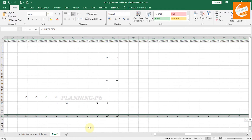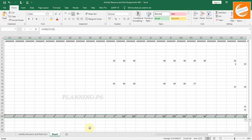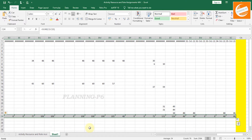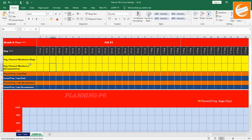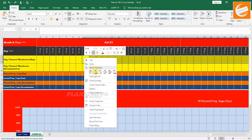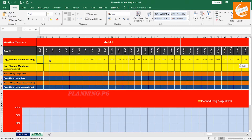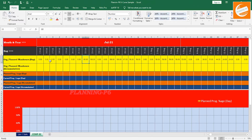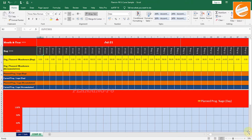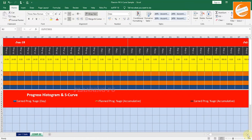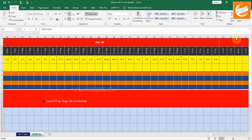Now we can pick that data starting from 22nd of July — before 22nd of July there are no manhours used. If you are extracting the sheet using a filter, you can see the start and end dates with zero manhours. Copy this data and go to the Excel S-curve sheet. Start from 22nd of July as mentioned, and paste special — values only. Place the values here and then put a zero value at the start. I have already set the date from 15th of July and then forward.